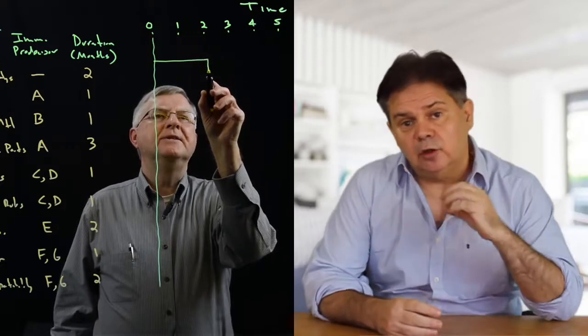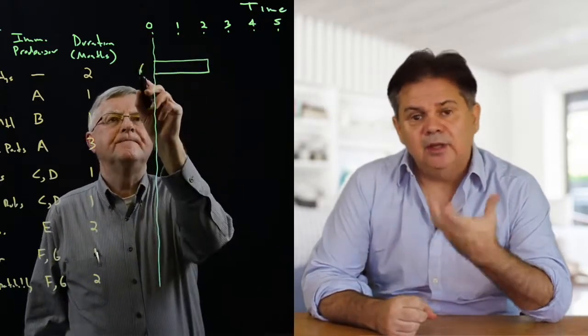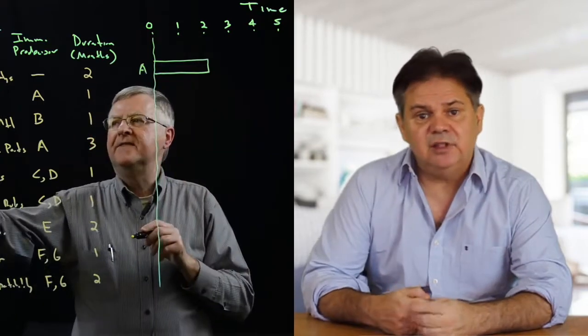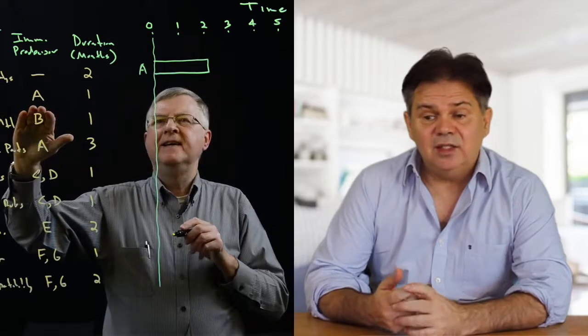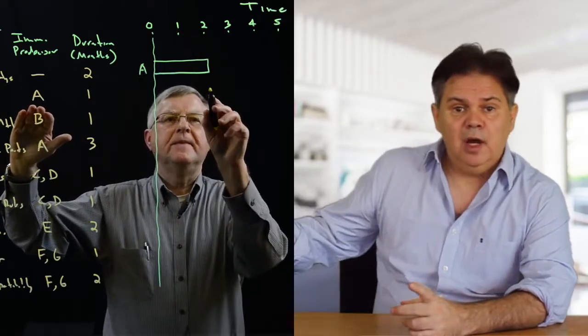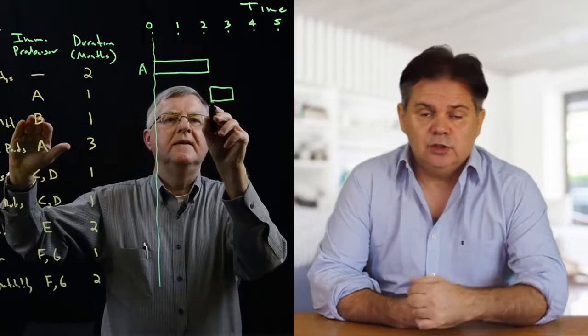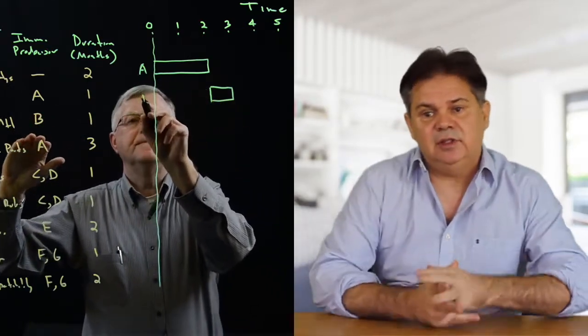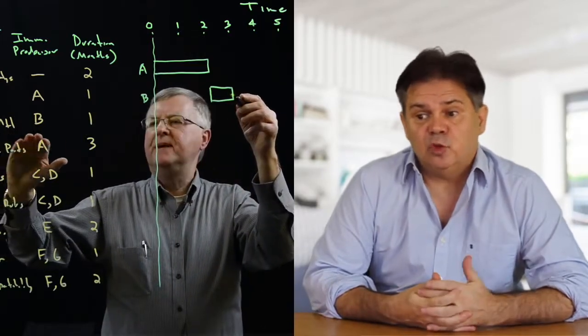What you do is take the lowest box of that WBS or that mind map, and give it to somebody to list all the activities that need to be done to do that box, and all the activities that need to be done from other boxes for them to be able to do that box. That way you start listing activities. Then the next step is putting estimated times to do each one of these activities.